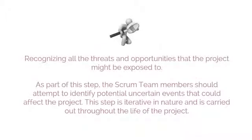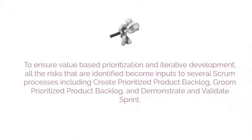Risk identification involves recognizing all the threats and opportunities that the project might be exposed to. The Scrum team members should attempt to identify potential uncertain events that could affect the project. This step is iterative in nature and is carried out throughout the life of the project. All identified risks become inputs to several Scrum processes, including Create Prioritized Product Backlog, Groom Prioritized Product Backlog, and Demonstrate and Validate Sprint.